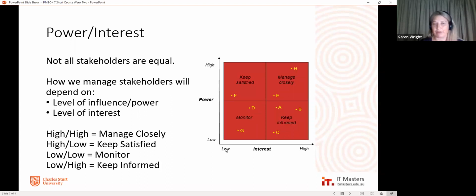So low power, low interest stakeholders at the bottom here, and high power, high interest stakeholders at the top. So I would hope this person is the sponsor or the steering committee in this particular example, but let's just call them stakeholder H. We've plotted them precisely in the location that they belong, so that we can see they're very high powered stakeholders and they're also very interested in the project. I have seen project managers just lump them in the quadrant, but I like to map mine precisely because, as you can see, there's quite a bit of difference in terms of power and interest from stakeholder E to stakeholder H. But effectively what we're trying to do here is say, these are the stakeholders we want to spend most of our time and effort on.